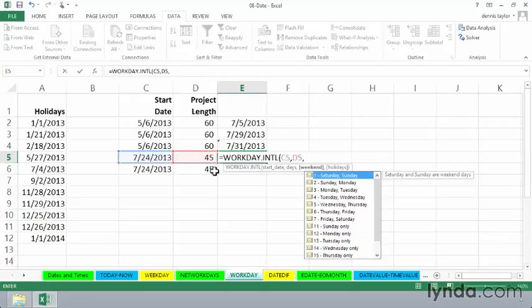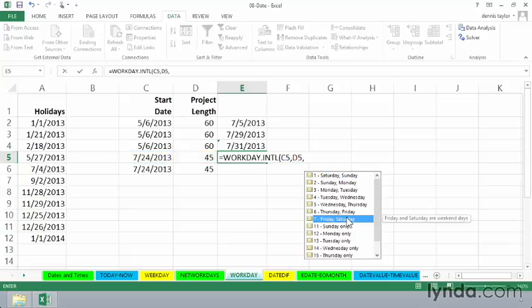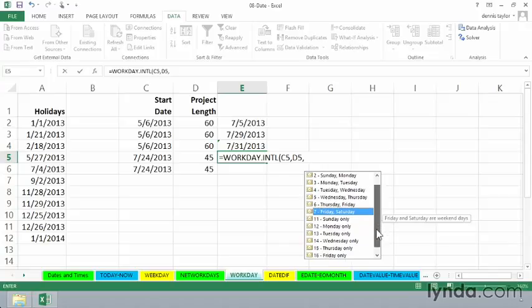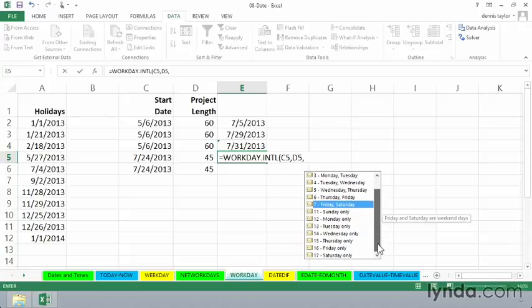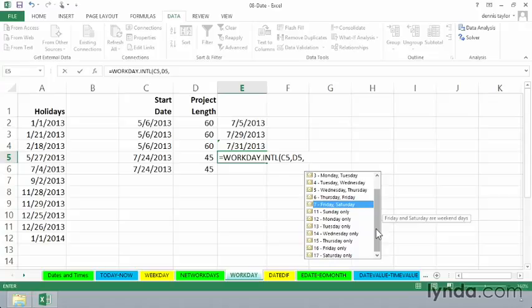But what kind of weekend do we have? And you'll see all the two-day consecutive combinations listed here. Some parts of the world, it's Friday and Saturday that's the weekend. And maybe based on the working environment here, and you're not necessarily thinking international, but maybe you've got one day only. So each day of the week is represented here as an option as well. So 17 different choices there.